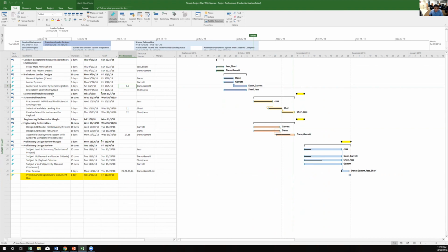And to change the progress bars on these ones, unlike the Excel where you could be specific with 75% or 80%, 86%, for Microsoft Project, they do have these tabs up in the top taskbar where it only goes from 0, 25, 50, 75, and 100%. So be aware of that as you start, want to show progress so that your team members can see as well.